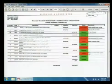The first document on page 216 in the packet is the updated RFP log, the requests for proposals. We're waiting on one RFP to still be submitted, and that's the water hydrant at the 50-yard line for the cooling station. The second document is the CAP log, the change allowance proposal log. If it's in red, it was either not accepted or revised, and greens have been approved.